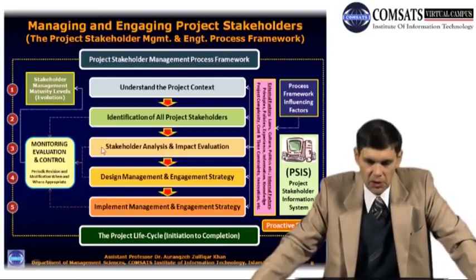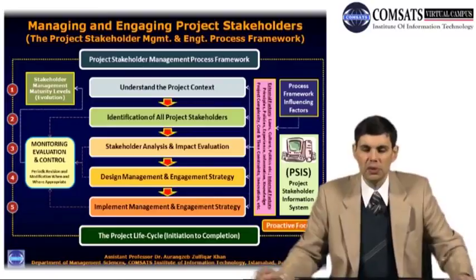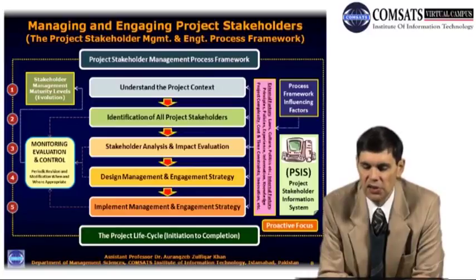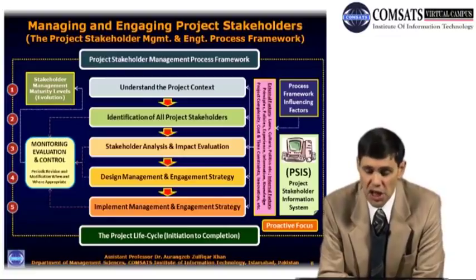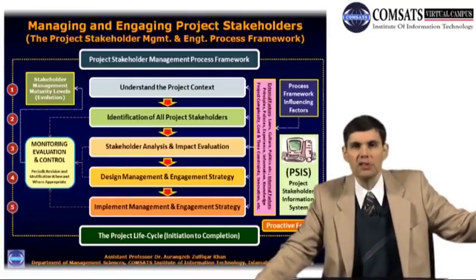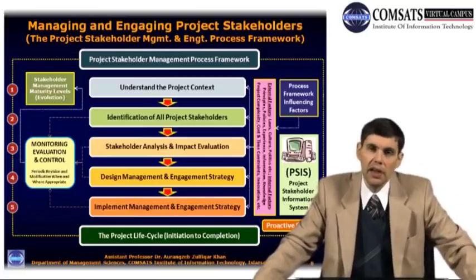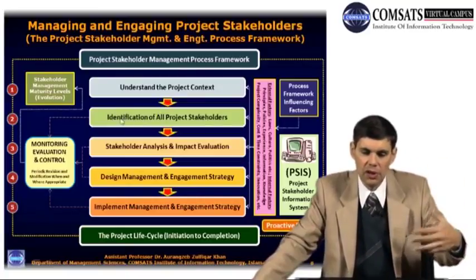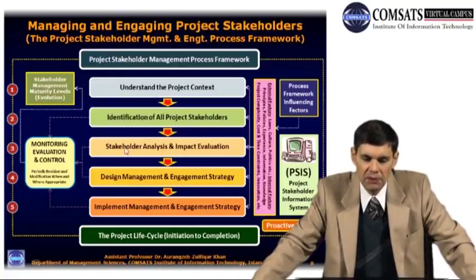box over here. Because you see, when you're identifying project stakeholders, as I said, stakeholders, they are dynamic. It's not only that their behaviors and expectations, etc., change, but also the actual stakeholders of the project can change over time. They might have a stakeholder today who is not a stakeholder a few days down the line. And then maybe a few weeks down the line, you have a new stakeholder who was not there at the beginning. So there has to be this constant sort of review element taking place with regards